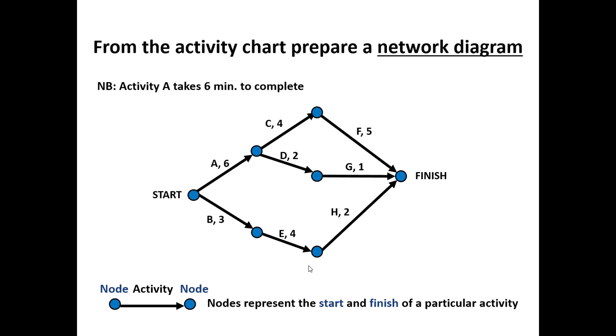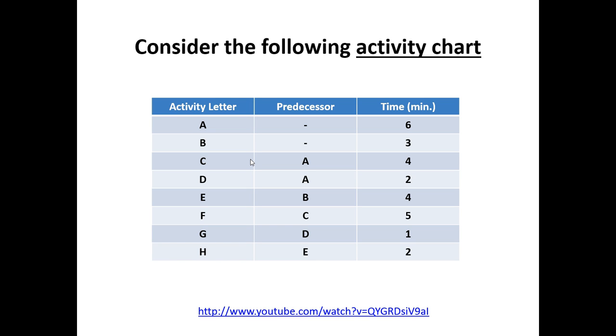Let's see what that looks like. So as we just said, you can't complete activity C until activity A has been completed. You can't commence activity D until activity A is completed. So this is a network diagram. It is a graphical representation of the activity chart.